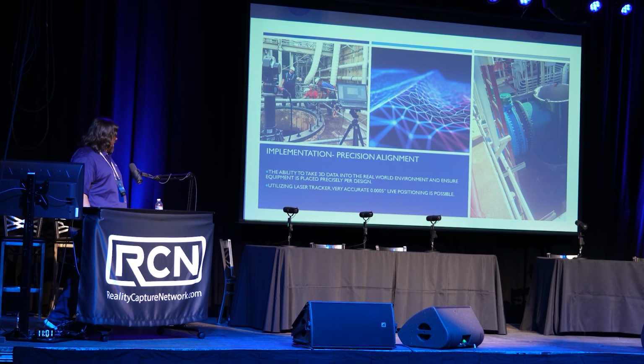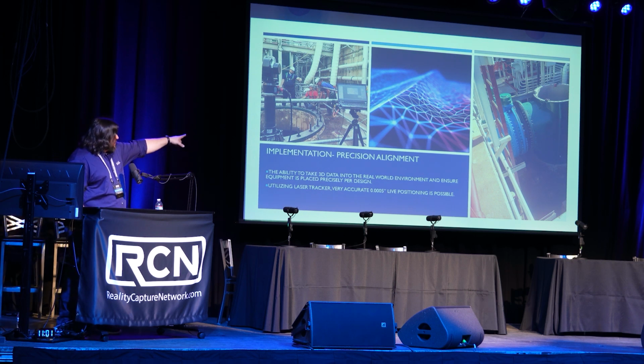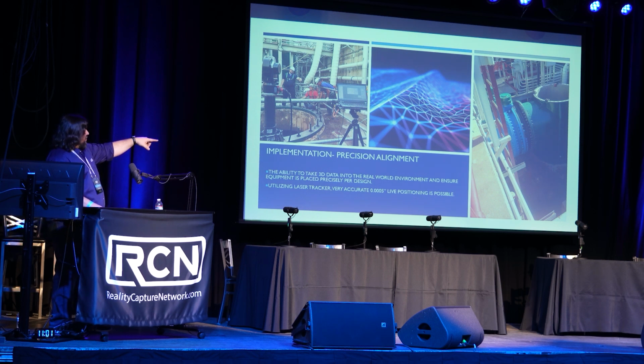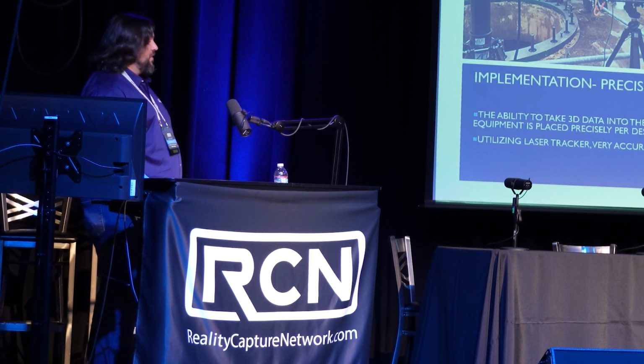Another implementation alignment aspect. Down there we had a ring that the discharge elbow would sit on. We took a laser tracker in this instance and got measurements of the horizontal connection of that discharge elbow, which set our Z elevation height and told us where our sole plate needed to be, and we were able to level that ring. We were given a 3 thousandths tolerance. We were able to leave them with a thou and a half as the worst out of tolerance that we ended up leaving them, and we did about 6 of these pump replacements.